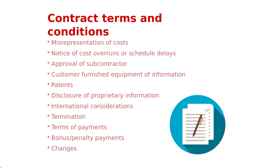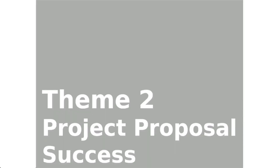Finally, there are the terms and conditions, which are quite important. These include misrepresentation of cost, notice of cost overruns, approval of subcontractors, disclosure of proprietary information, terms of payments, bonuses, and penalties. It is important that these are discussed and that every single stakeholder fully understands the terms and conditions of the contract. This wraps up the first part of this chapter, and the next part will discuss project proposal success.